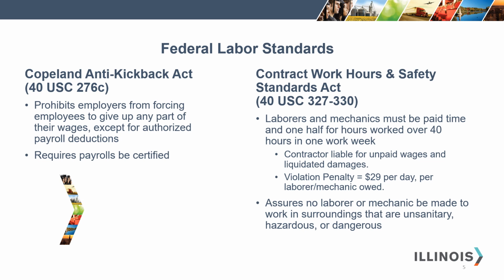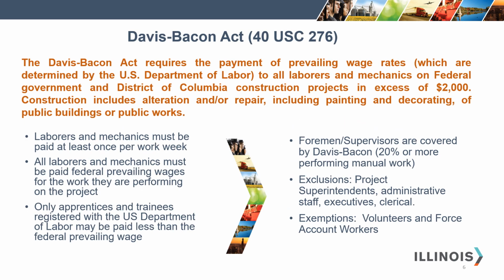CWHSSA also assures that no laborer or mechanic be made to work in surroundings that are unsanitary, hazardous, or dangerous. The Davis-Bacon Act requires the payment of prevailing wages to all laborers and mechanics on federally funded projects in excess of $2,000. Construction includes the alteration and/or repair, including painting and decorating of public buildings or public works.